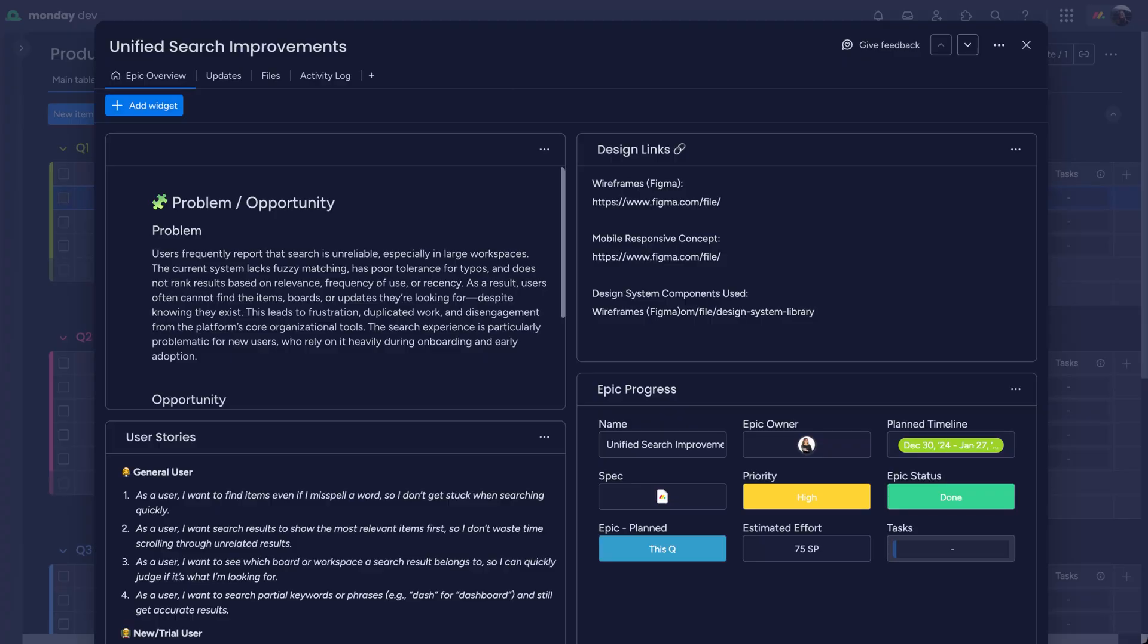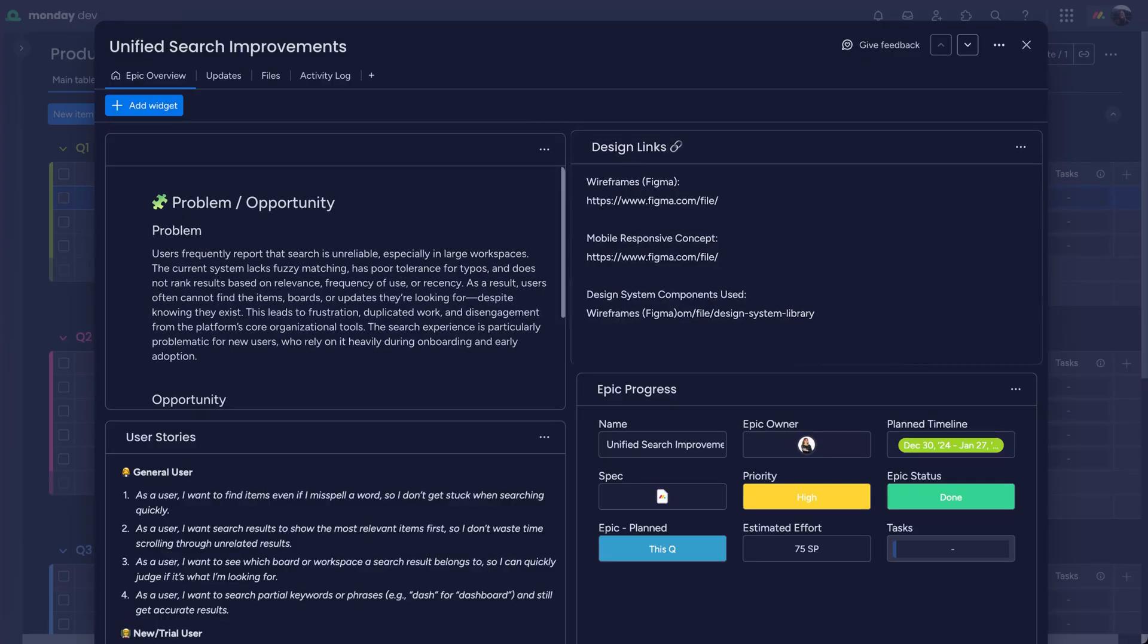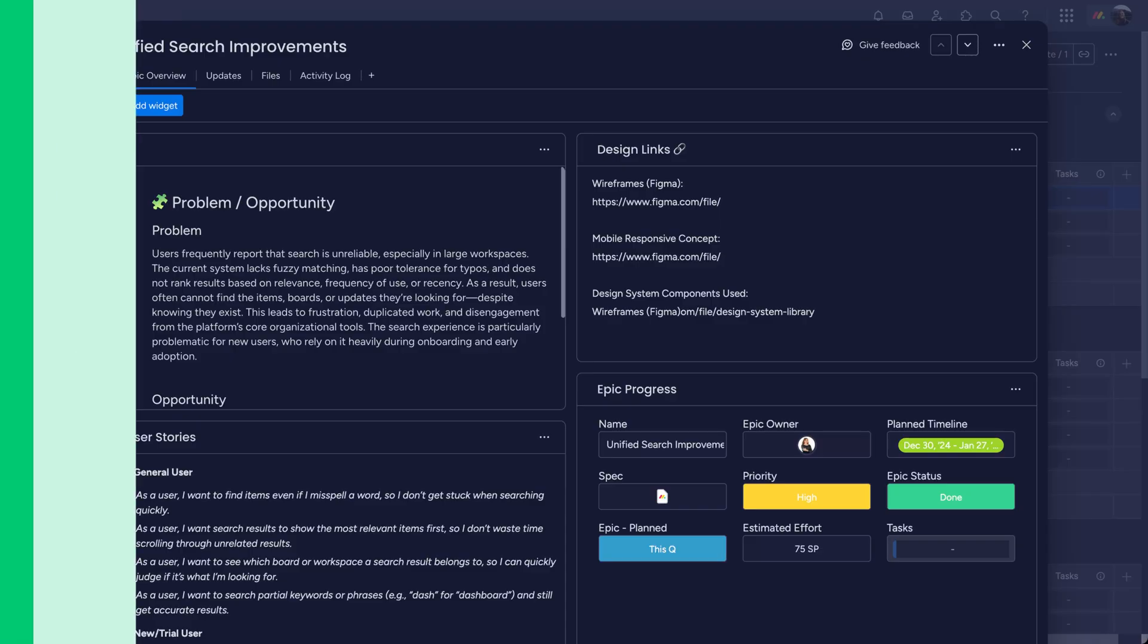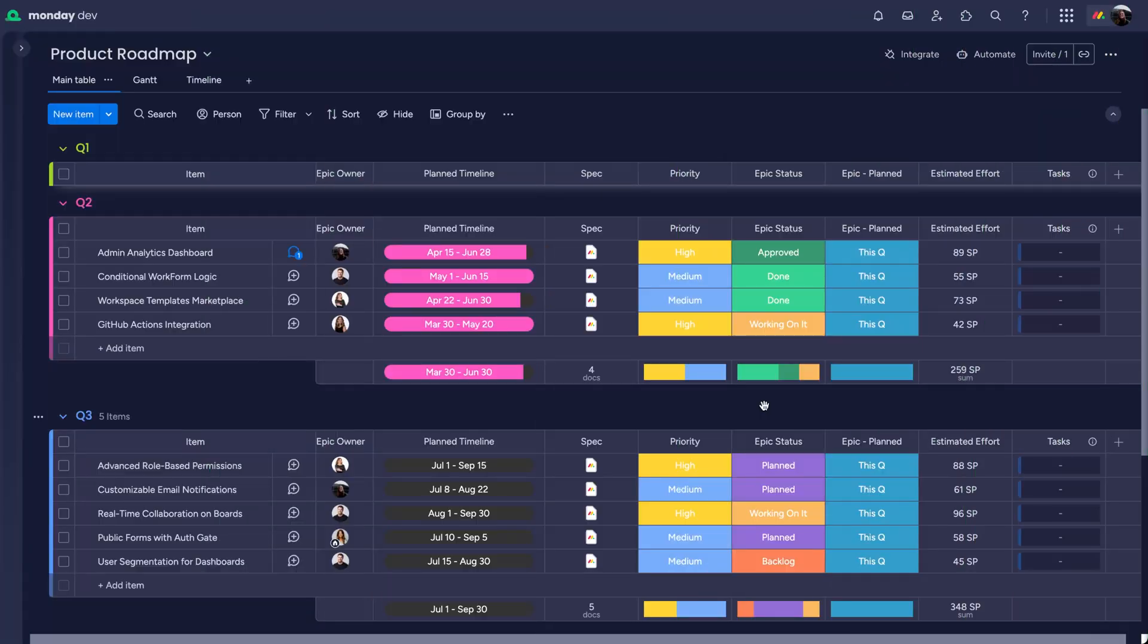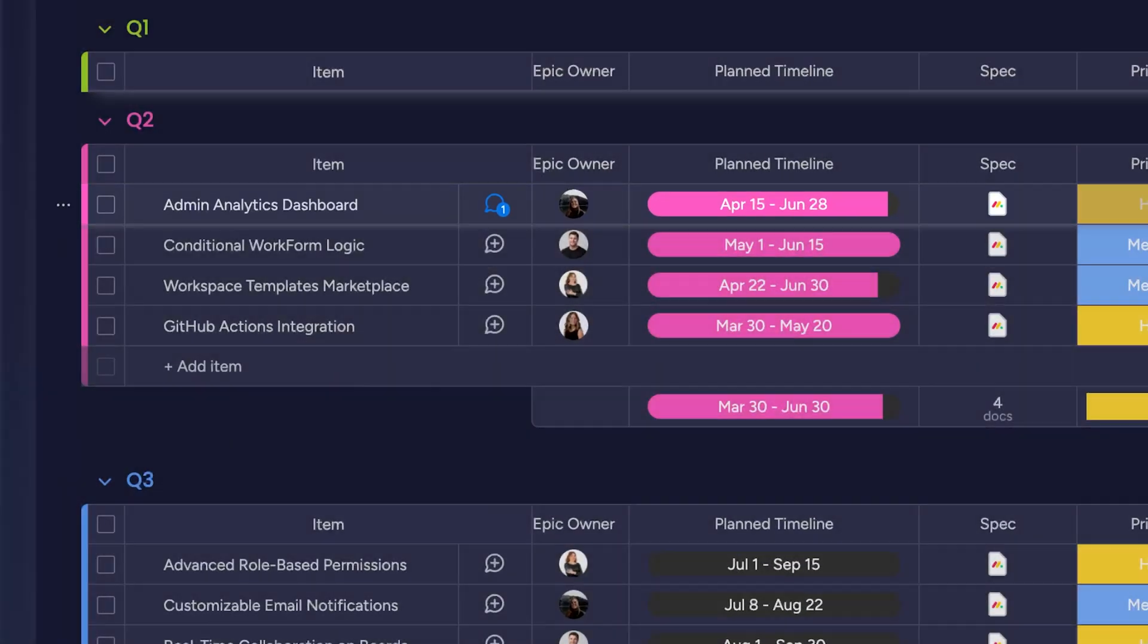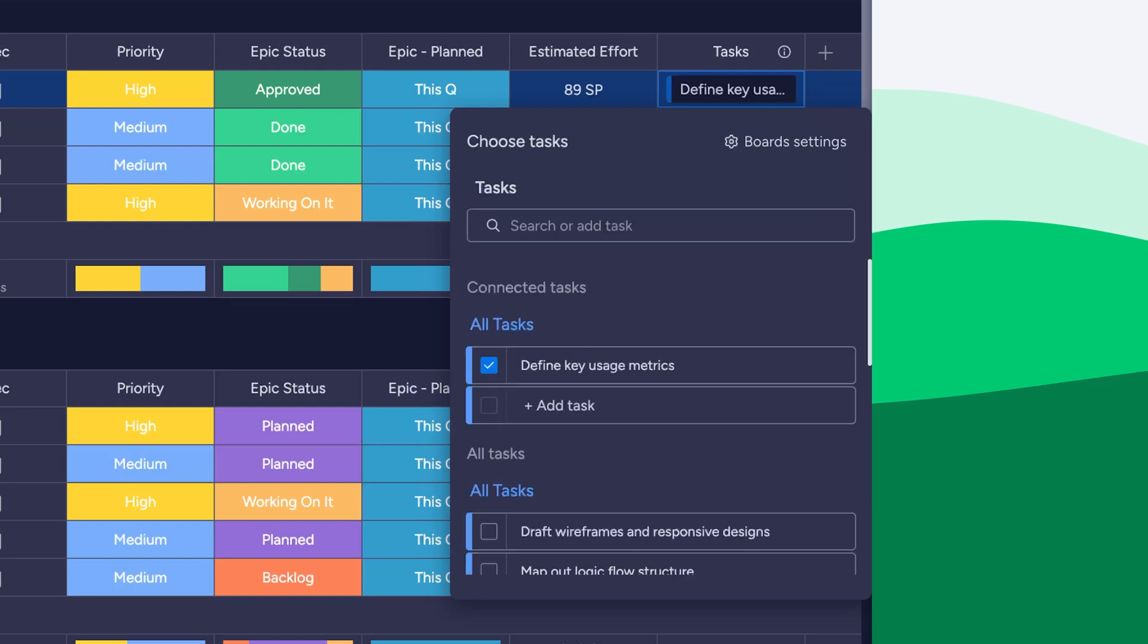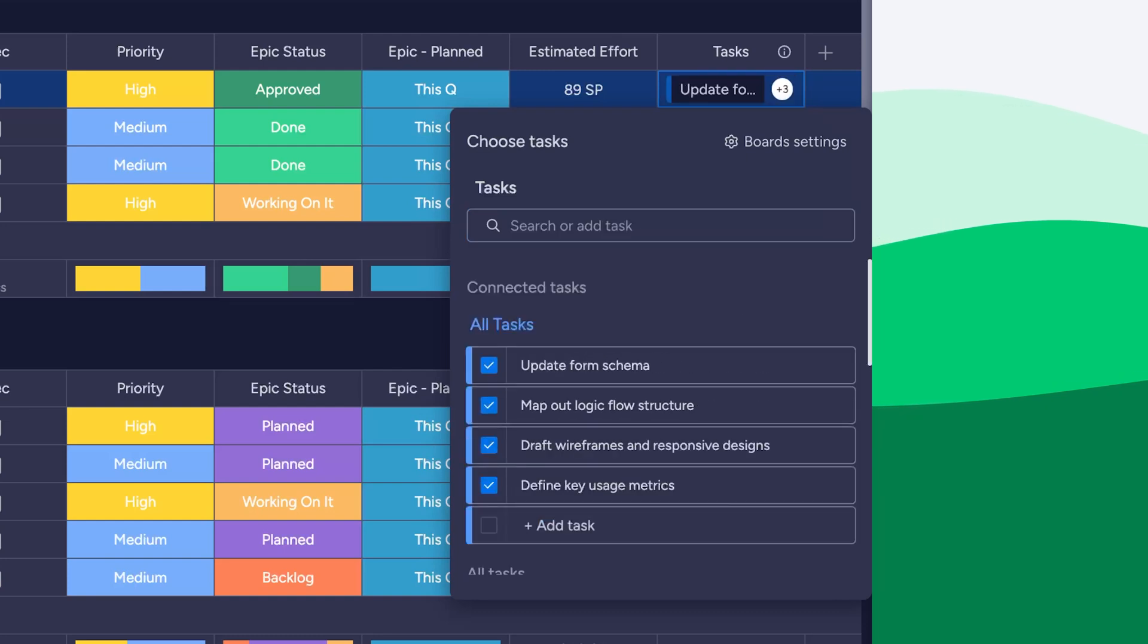Click into a feature to view details like specs, design links, and user stories, keeping everyone aligned without chasing updates. Let's say we're moving forward with building an admin analytics dashboard. We'll break it down into actionable tasks, all housed on the tasks board.